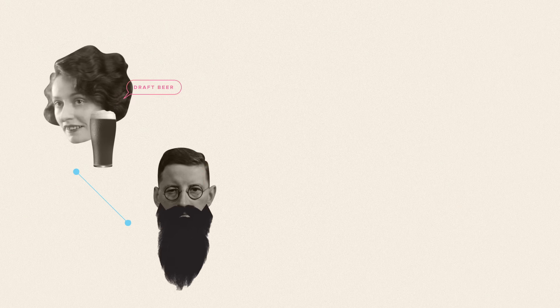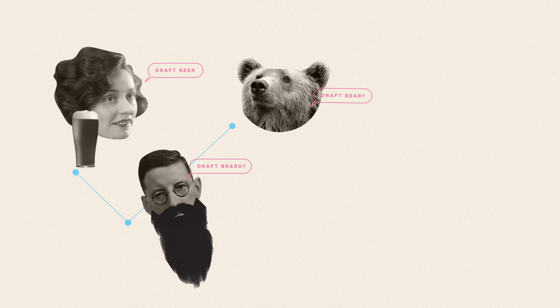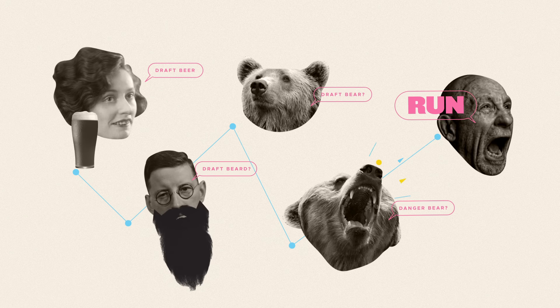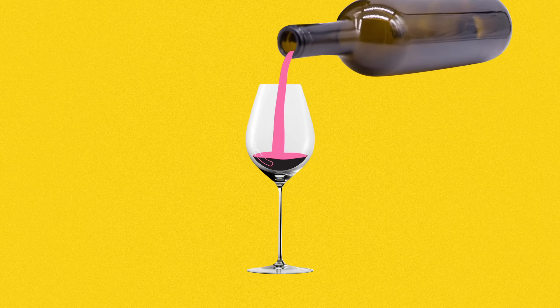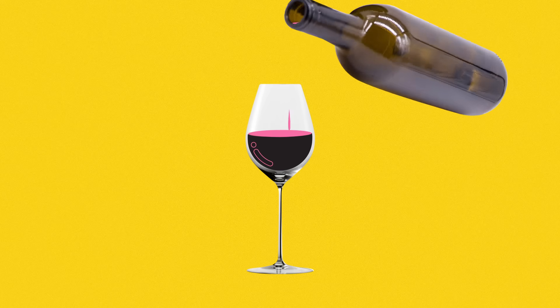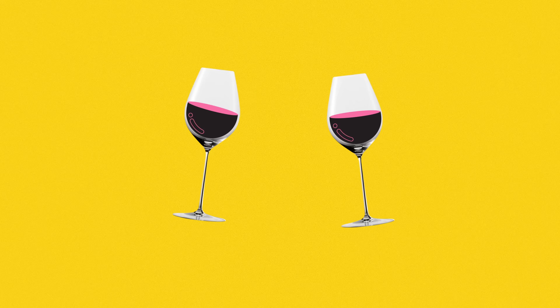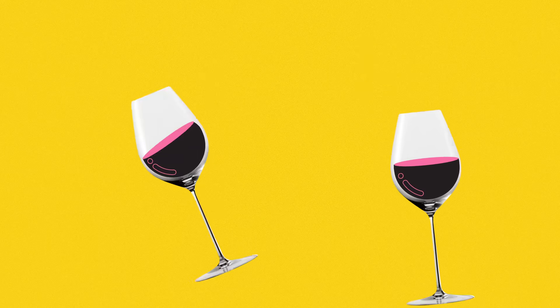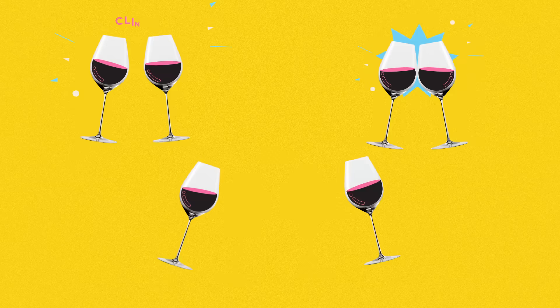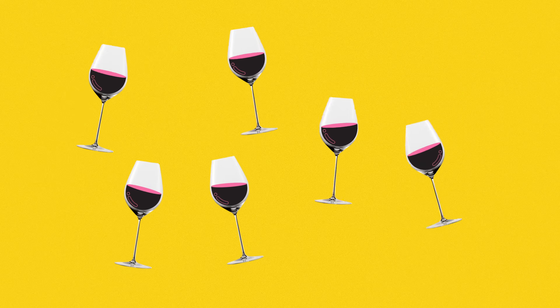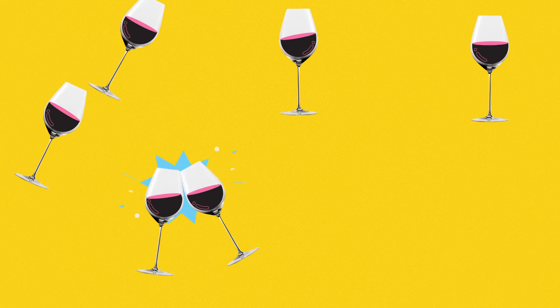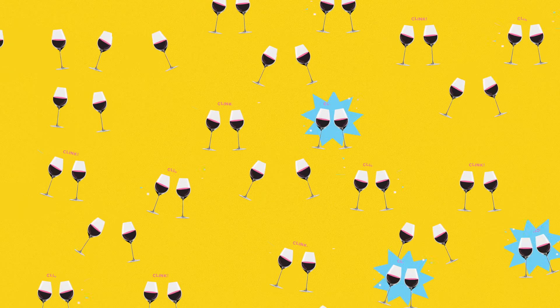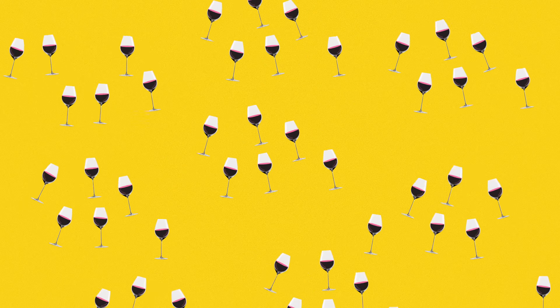The second is communication. As a team gets larger, communication gets exponentially more complicated. The easiest way to demonstrate this is to imagine toasting with wine glasses at a party. In a small group of people, everyone can easily clink glasses with everyone else. But in a larger group, people only touch glasses with those near them. Which is not to say it's impossible for everyone to cheers everyone. It's just going to slow things down. A lot.